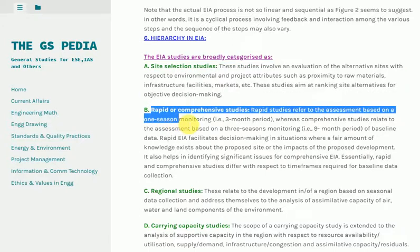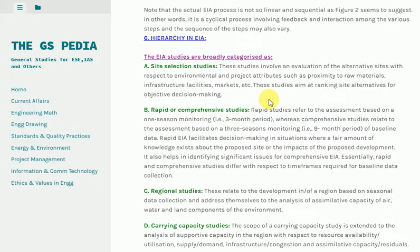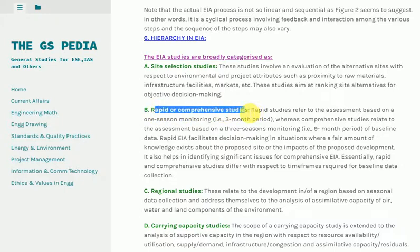B) Rapid or Comprehensive Studies: Rapid studies refer to assessment based on one season of monitoring, i.e., a 3-month period, whereas comprehensive studies relate to assessment based on three seasons of monitoring, i.e., a 9-month period. Rapid EIA facilitates decision making in situations where a fair amount of knowledge exists about the proposed site or the impacts of the proposed development. It also helps in identifying significant issues for comprehensive EIA. Essentially, rapid and comprehensive studies differ with respect to the time required for baseline data collection.